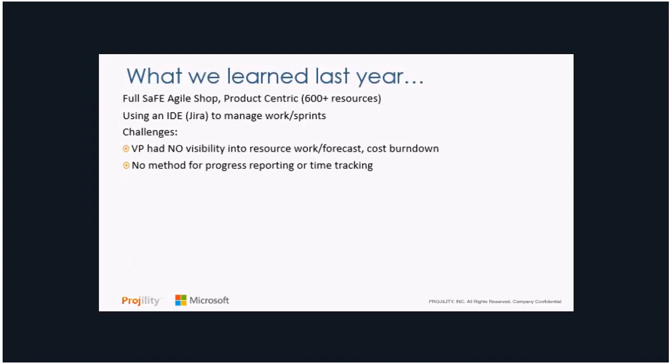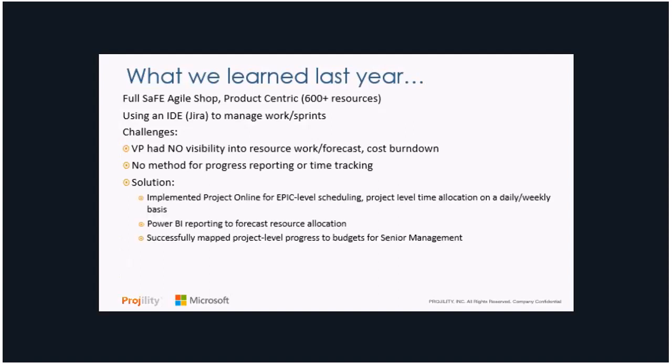There also wasn't a method for progress tracking or doing any kind of time tracking, because a tool like Jira and DevOps, they're not time tracking tools, they're development environments. So there was an inherent challenge in getting actuals to do any kind of resource and work forecasting.